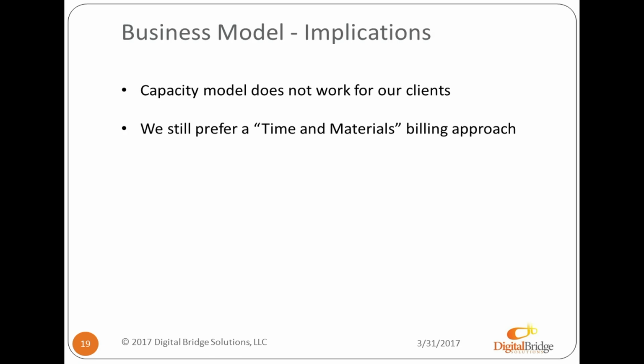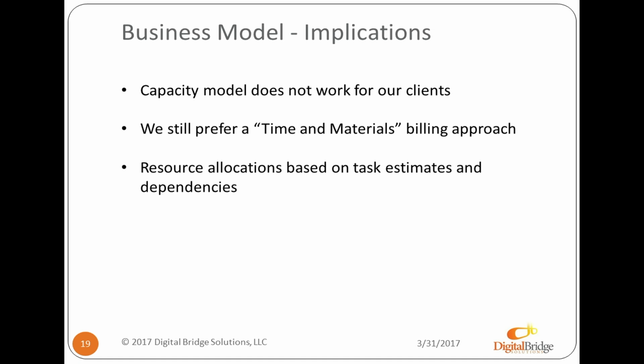We as an agency, though, still like the time and materials approach, where there's an hourly rate for a resource. So what that means is that our estimates and rates are no longer based on the time it takes for somebody to just exist and consume oxygen in your environment, but they're more based on a task, right? So our resource allocations are based off of how much time we think it's actually going to take to do a task, and then recognizing that there are dependencies. So before Joe can do his work, probably there are some requirements that need to be gathered or design that needs to be created first. So I can then stagger Joe's time until those things are available for him to actually work on.